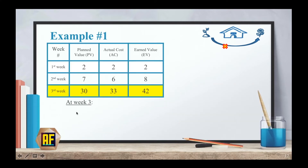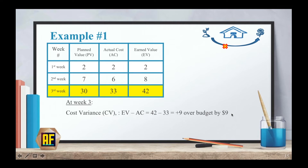At week 3, my cost variance — EV minus AC — is $42 minus $33, which is plus $9. This means that we are over budget by $9, which is good. Moving on to my schedule variance, SV, which is EV minus PV: 42 minus 30 equals plus 12, which means that we are progressing very well.